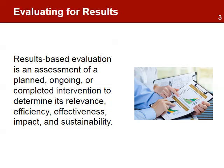Results-based evaluation is the assessment of the project intervention in order to determine its relevance, efficiency, effectiveness, impact, and especially its sustainability. The purpose is to provide credible and useful information that can be used in the decision-making process of key stakeholders and the use of lessons learned that can be incorporated in the next cycle or in the development strategy.